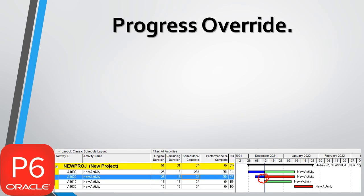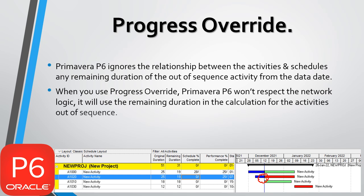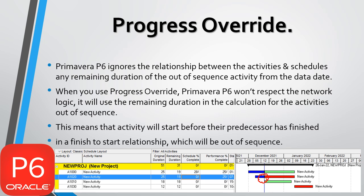Progress Override: Primavera P6 ignores the relationship between the activities and schedules the remaining duration of the out-of-sequence activity from the data date. When you use Progress Override, Primavera P6 won't respect the network logic — it will use the remaining duration in the calculation for activities out of sequence. This means that an activity will start before its predecessor has finished in a finish-to-start relationship, which will be out of sequence.